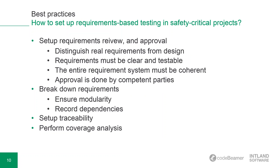Now let's talk about best practices. We understand the benefits of requirements-based testing, but it's often a question of how to plan such testing activities. An effective test cycle must have a defined set of processes and deliverables. Which processes and deliverables are applied depends on available resources — the people, source materials, time, and the mandate of the task organization. The primary processes and deliverables for requirements-based functional tests begin with test planning: defining the scope, schedule, and deliverables for the functional test cycles.